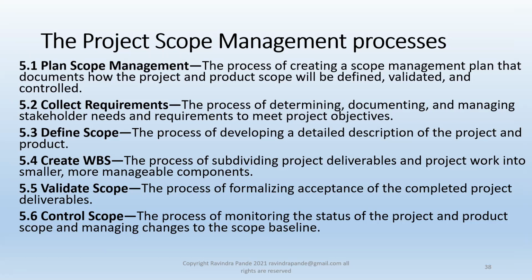Let's say we want to fit 6 biometrics at a State Farm office in St. Louis. So Ravindra is leading this small part of a project, or you can call it a module as well. Ravindra is going to St. Louis with 6-7 biometric devices, and we have to install them on the 6th door. Now, how do you disintegrate this work? The work might include travel from one place to another. Work might include procuring the entities before starting travel. Work might include a different number of resources: man, material, machine.